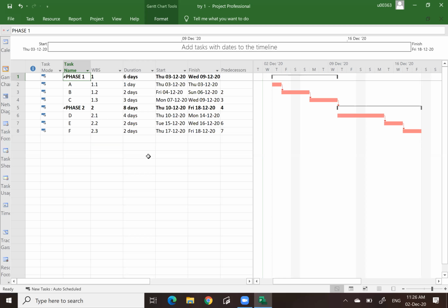Previously you needed to draw on a separate drawing sheet. Okay. All right. So that's how you organize your WBS. You do not input WBS according to what we learned, but actually you need to organize by selecting the activities and then clicking on indent.